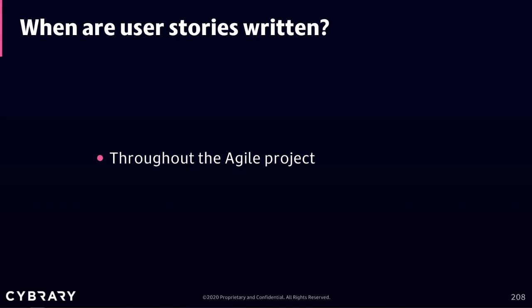Everyone on the team participates in the goal of creating the product backlog that fully describes the functionality to be added over the course of the project, or in 3 to 6 month release cycles within it. Some of these Agile user stories will undoubtedly be epics. Epics will later be decomposed into smaller stories that fit more readily into a single iteration. Additionally, new stories can be written and added to the product backlog at any time by anyone for any reason.